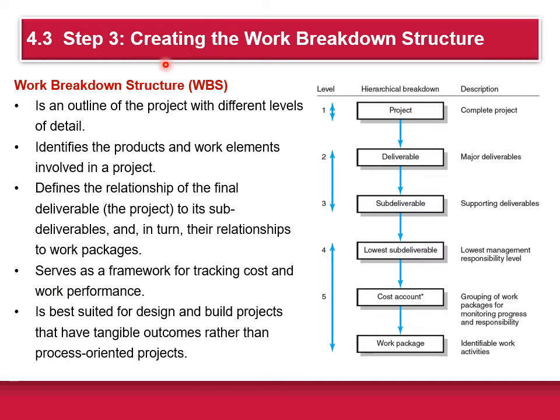Step 3 is actually creating the work breakdown structure. So the work breakdown structure begins with the product as the final deliverable. From the product, you break the product down into smaller pieces called deliverables. Those pieces are broken down into smaller and smaller pieces called sub-deliverables.